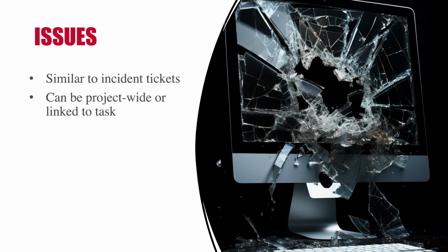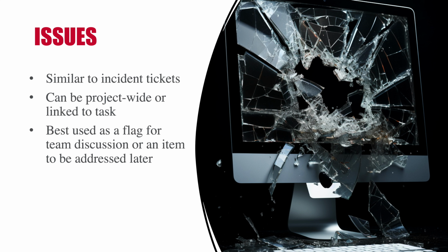When to log an issue can be a bit of an art. Sure, the intention of the exercise is to ensure blockers are identified and dealt with in a holistic and transparent way. But there's certainly value in the peace of mind that comes when project members can itemize challenges in the tool instead of having to constantly remember what is outstanding. So maybe a good starting point is to use issues to flag challenges or blockers for the team's attention, or for problems that need to be decided on later.